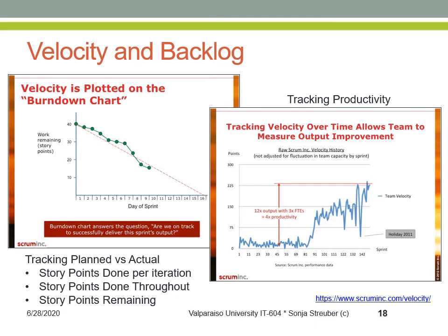In our example here, you see that team velocity doubles around 91, and we can see that nobody was working well around the holidays because velocity dropped from 225 to about 50 within that 2-week time box. Each product owner's goal is to keep velocity high, which means fast, high-quality productivity, because that keeps the budget down. Studies have also shown, though, that that can lead to early burnout symptoms of technical staff due to the increased pressure to perform.